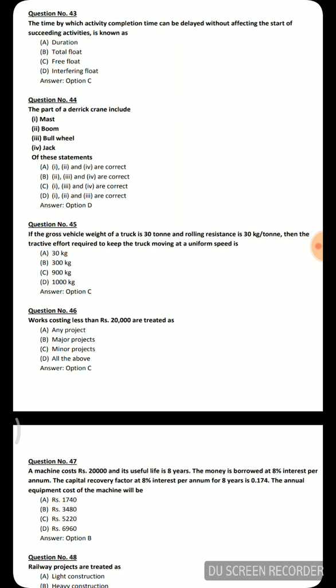Next question: the time by which activity completion can be delayed without affecting the start of succeeding activities is known as — duration, total float, free float, or interfering float. The correct answer is free float.